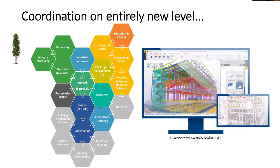Project coordination becomes critical because you're sending panels that your construction crew needs to know how to handle. You cannot just dump this material in a puddle waiting on the construction site for its turn — this has to be coordinated. And that coordination becomes so complex that an essential part of it becomes IT: modeling, project integration software and platforms — the BIM that supports coordination of projects.